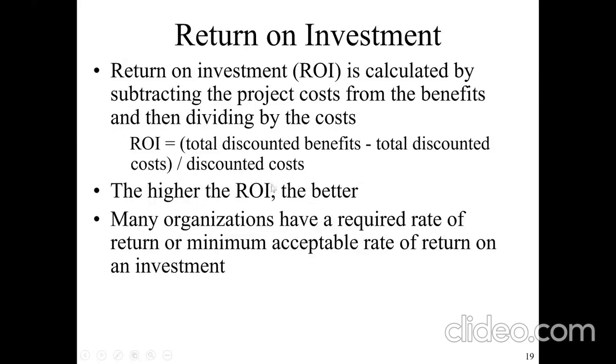So the higher the return on investment, the better. Many organizations have a required rate of return on investment. Some companies have a rate that, okay, if we don't have a return on investment of, let's say, 10%, we will not embark on it. So it's an organization decision. We can choose that, for us, we will peg our ROI at 12%. If we don't get that, we will not embark on any project that gives us less than 12%. And so that is that.